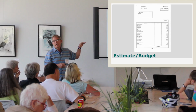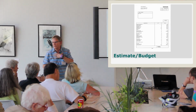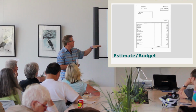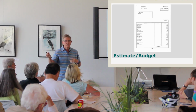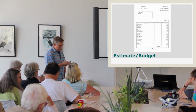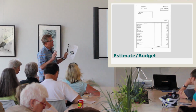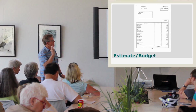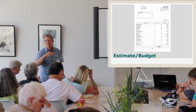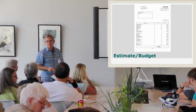So that estimate is based on what you tell me you want to finish it and incorporate in. The more the customer tells me, the more accurate this is going to be. This is the budget that they use for financing. We establish the building contract. So those items complete the feasibility study, and like I said, it's presented real quick. Again, these are issues that you should address before you finalize the contract with the builder, or decide to take it on yourself, or whatever you're going to do, so you don't get down the road and things go sideways.